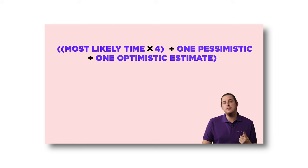If this reminds you of PERT, you're right! The two project management methodologies have some similarities, but they are also different. PERT calculates the time estimate based on a formula that takes into consideration the average time, pessimistic time, and optimistic time estimate. Click here to watch our video about PERT and find out more. In CPM, it's important to make a distinction between real critical tasks and those that are not. Don't let non-critical activities fool you, though — if delayed for long enough, these activities can also become critical and delay the entire project. You have to sort out carefully which activities can be pushed back and for how long.